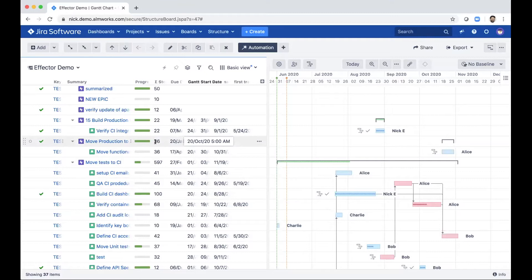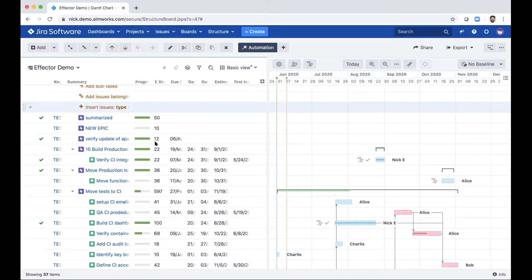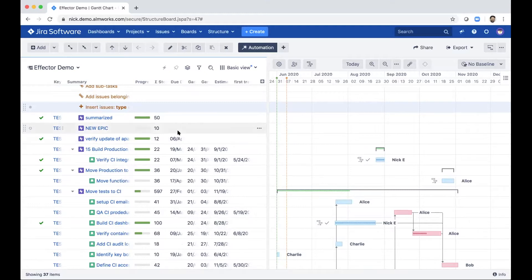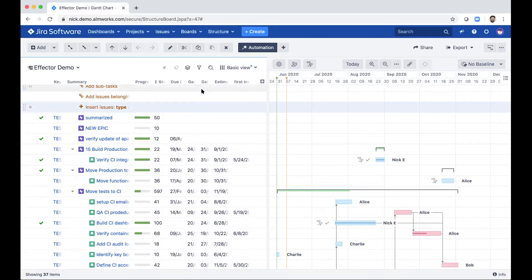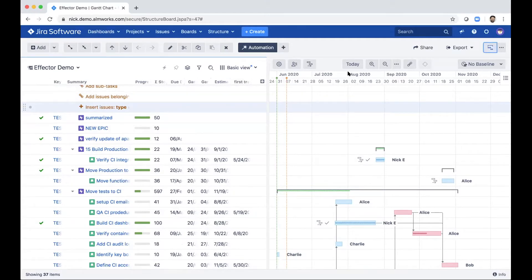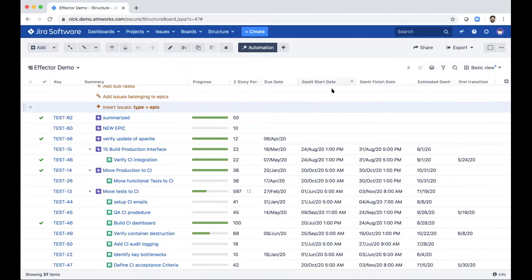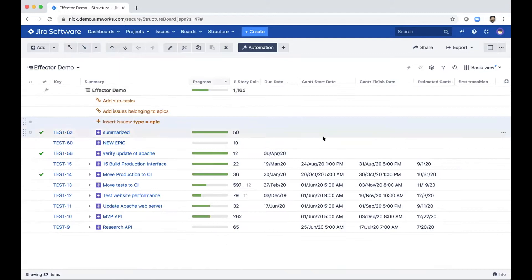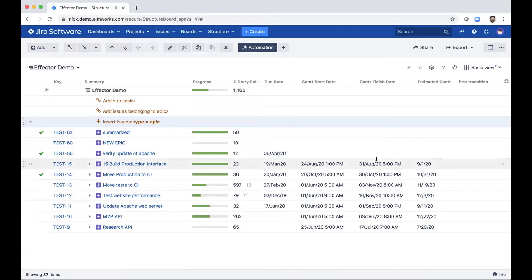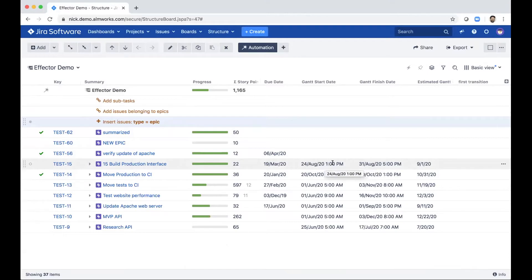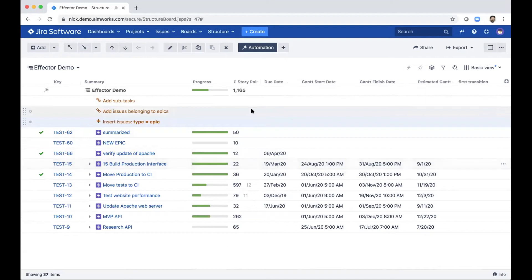So what effectors allow us to do is to essentially copy data from one place into a field somewhere else. So here, what I'm going to do is I'm going to copy some fields from the Gantt chart. And so we can see over here, it's a little bit collapsed right now. But I've got this Gantt start date and Gantt finish date field. And what this is telling me is basically when the earliest issue underneath this epic is going to be started, and when the last issue is going to finish. So this is kind of my plan according to Gantt. But this is a calculated field. So it's only available inside structure and inside Gantt. But when I use an effector, I can copy it somewhere else and make it available elsewhere in JIRA.